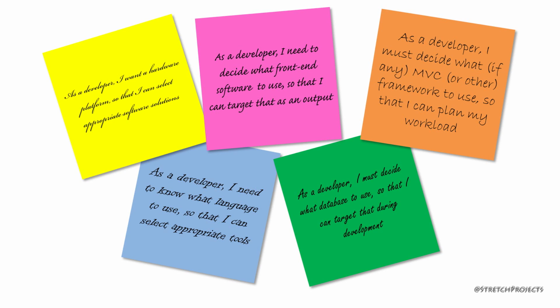So once the sprint objectives are roughly agreed, and the business roughly understands which user stories are going to be focused on during a specific sprint, those user stories are then typically transferred onto post-it notes and placed on a whiteboard or some other board. This whiteboard is usually split into about 5 sections. The exact number of sections and the section names can and does vary, but an example would include a section for backlog, a section for to-do, a section for in process, one for needs testing, and another for completed.